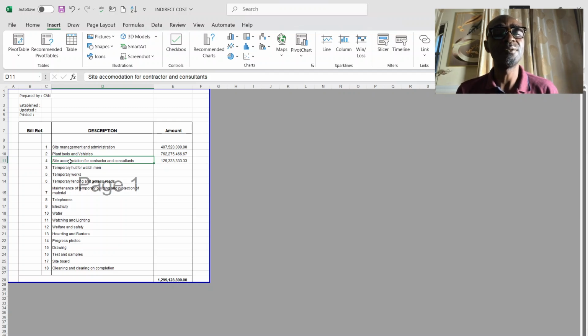Now, like I said, we have 56 persons on the organogram. And for those 56 persons, you sit down to determine how you want to pair them in each porter cabin, how many persons can be in one porter cabin. The project manager, of course, is going to have one cabin to himself. The deputy project manager or the production manager will have one cabin to himself. The rest of the officers, aside from the quantity surveyor who deals with important documents, can share a porter cabin.